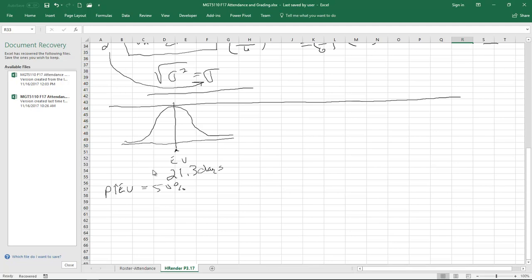So the third part that we're working on now comes out as 2 different cases. The first one is, what's the probability of a certain day? For instance, we already calculated 21.3, we know that's 50%. If we pick dates beyond 21 days, the probability should go up. It's the probability under the curve, we add all of that up, and the area under the curve keeps increasing as we move to the right. So if we said, what's the probability to hit 25 days, at this point I don't know what that is, but I know it's greater than 50%. In other words, we know which direction to go here if we're trying to improve our chances.